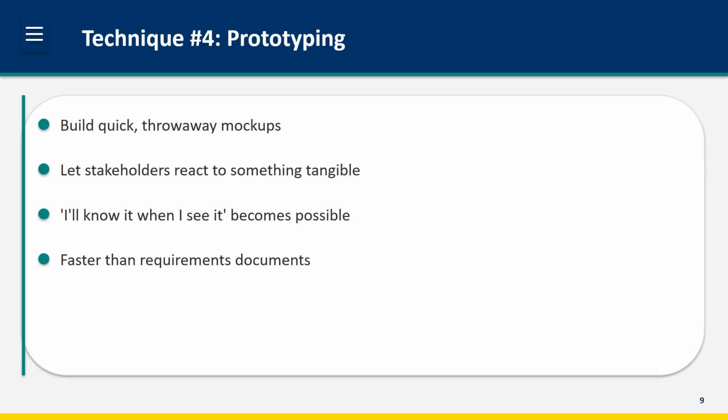Prototypes can be paper sketches, wireframes, or clickable mock-ups. The key is speed. You're not building the solution, you're testing understanding. Prototyping often surfaces requirements in hours that would take weeks to discover through documentation.